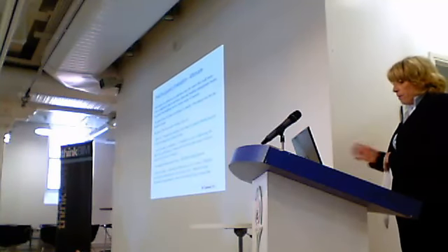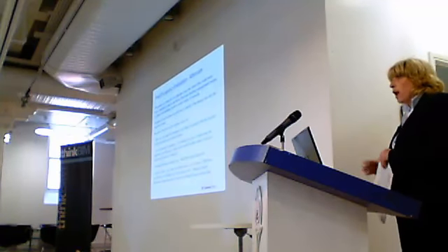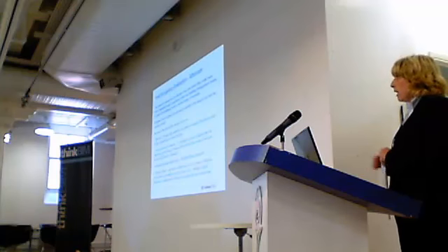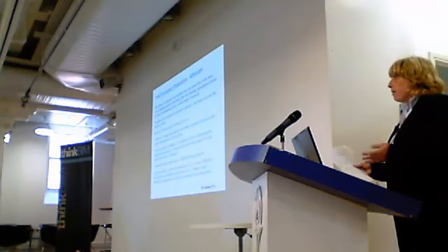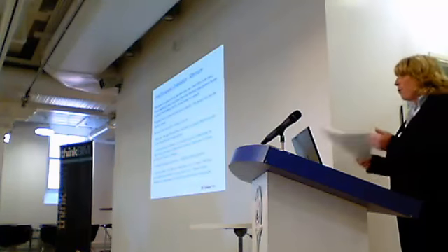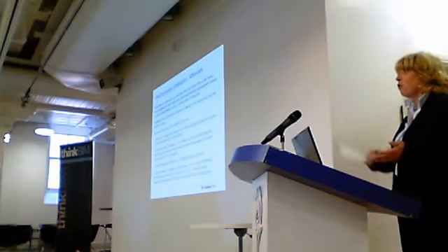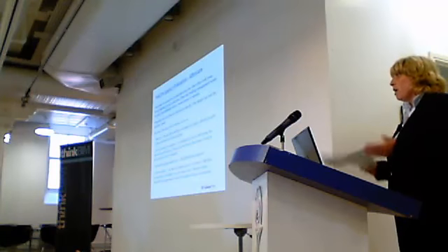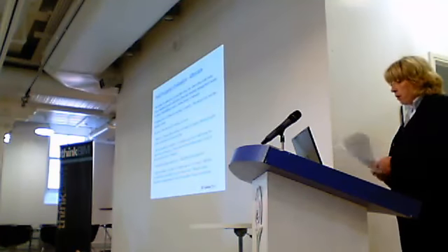Defects liability is an interesting one. This is one that we've been looking at of maybe this is how we can tie the accountability back. Do we extend the defects liability from the traditional 1 year and take it up to 3 years? But what does that mean? Does that mean that it's just increased cost and you're passing it down the supply chain? So there's some questions around that, but that's one way that we could possibly do that.